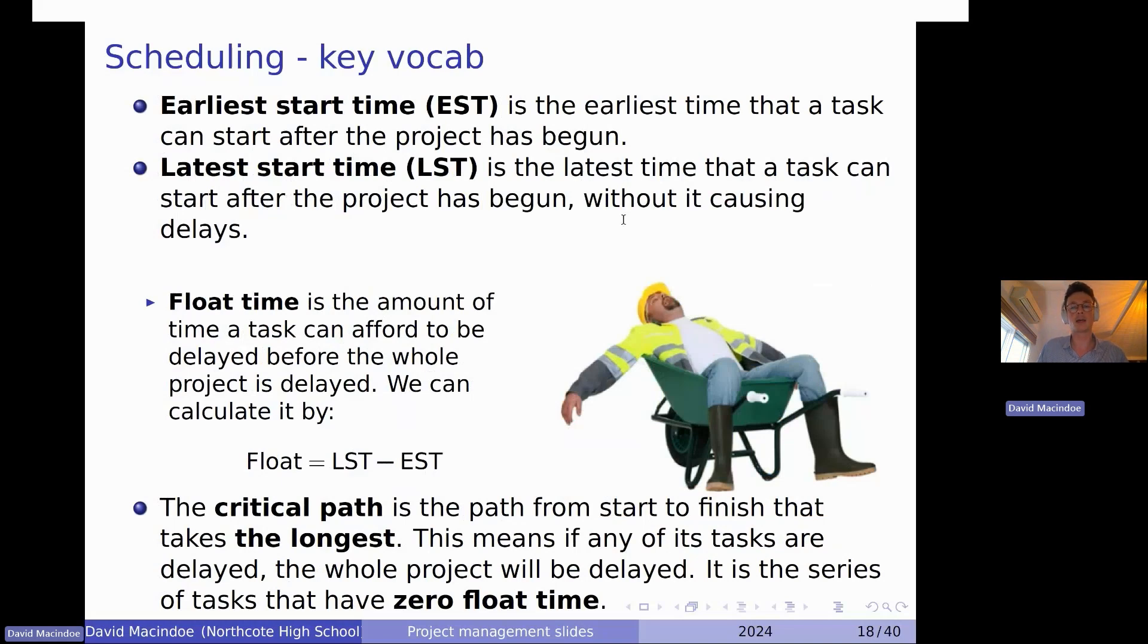And then the critical path, I think the easiest way to understand it is just to understand it as it's the longest path that goes from your start vertex all the way to your finish vertex. So it's the stuff that overall takes the most amount of time. It means that those are the things that you can't allow for any delays. There's no float time there. You've got to have all of those immediately start after their predecessor has finished, or otherwise you're going to introduce delays into your project.